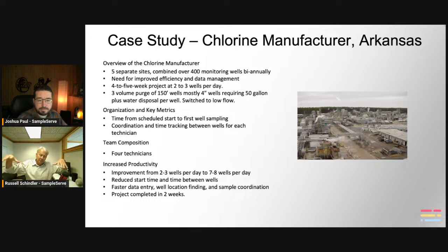So when you moved from one project to the next, it was several miles away. But when you're on that particular project, the wells were just like a normal one, not too far apart. And so we got that down to a 2-week project, where it was a 4 to 5 week project before. We would go to Arkansas twice a year and spend two weeks down there. And again, it was an incentive to get out of there. We were actually working 7 days a week, in most cases.